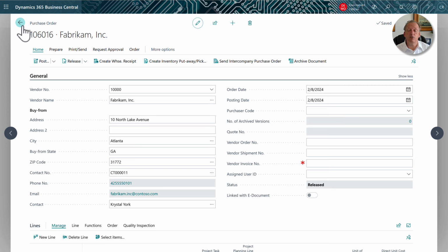The next thing I would like to review with you is just a straight purchase invoice, where we don't issue a purchase order at all and there's nothing to match against. We just called the vendor and said, hey, send something out or provide some services like a subcontractor, and they simply send you an invoice after they're done, and you want to simply record that on a particular project. So let's go take a look at that.